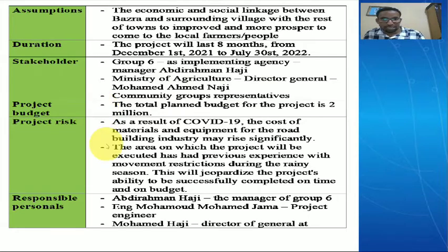The project risks are as follows: as a result of COVID-19, the cost of materials and equipment for the road building industry may rise significantly. This is just what we fear, but we hope it will not actually happen. The area in which the project will be executed has previously experienced movement restrictions during rain.